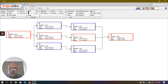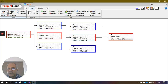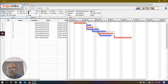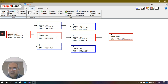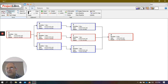This network diagram looks a bit different from the diagram on paper because they represent two different methods. The method on paper is the Arrow Diagramming Method, which software doesn't follow. Software uses the newer method — the Precedence Diagramming Method (PDM), also called Activity on Nodes. What you're seeing is an amended version of the full method, but it gives a very good idea of what's going on.